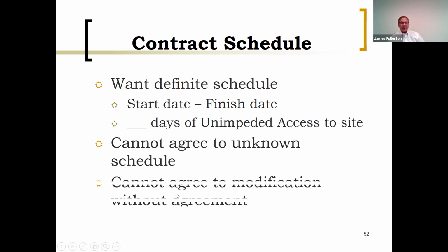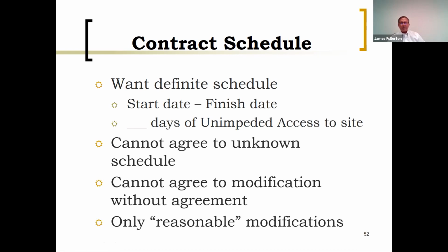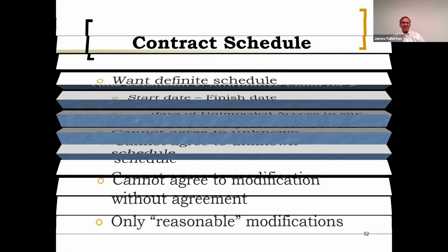You cannot agree to an unknown schedule. You cannot agree to modifications to the schedule without agreement. Only reasonable modifications. All right,